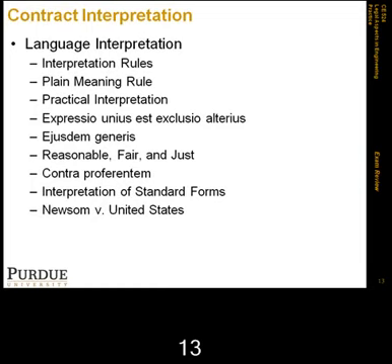ambiguity, where the contractor failed to consult the specifications of the contract for the construction of 3 buildings, and the drawings referred to a first and second floor in one of the buildings, but not others. So the caption for the first floor was included in all 3 buildings, while the second floor drawing was only included for the 3rd building.